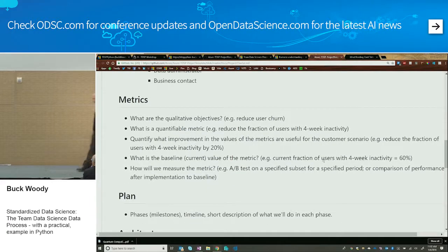Let me tell you something. This says I've got over 30 years of experience in the IT industry. I've got way over 30 years. I'm very old. And let me give you a little secret I've discovered painfully over the many years of my life. When you go into a project, define the success criteria so that you can end it. Do that at the start. Many politicians could be taught this lesson. Go in with an exit strategy.